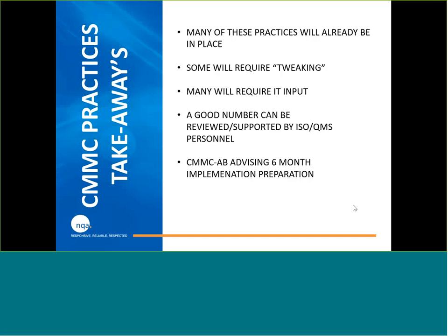That probably won't happen. So 6 months internally, and then it's really hard to tell at this point, but as far as getting in the queue for certification, I would say longer than ISO, longer than AS. So you might be talking at least 2 to 3 months, maybe 2 to 4 months, maybe longer, especially if you're looking to be part of the first early wave.